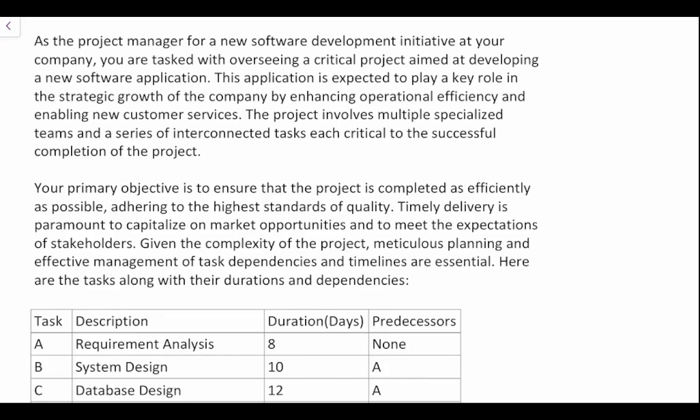So there are 6 basic steps to critical path management. We have to define the project and all of its significant activities and tasks. We have to develop the relationships amongst these activities, so we have to determine which steps are immediate predecessors. In other words, what are the activities that must be completed before the next activity can begin?